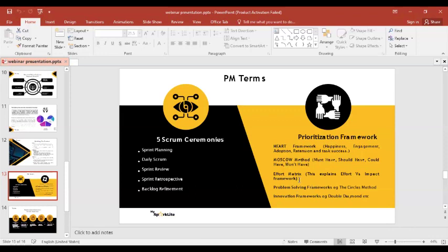And then I said the effort matrix. Now the effort matrix is saying: which feature, user story or epic will I do that will give me the most amount of impact with little amount of effort? So that will now determine which of the user stories you put in. That will define which of the user stories, which of the features or epics will be considered, and which one will be suspended for later.